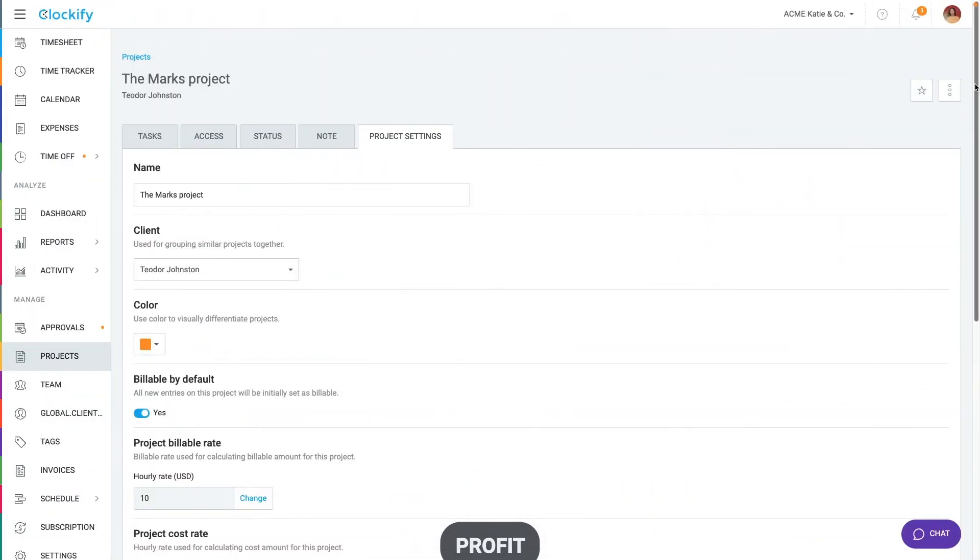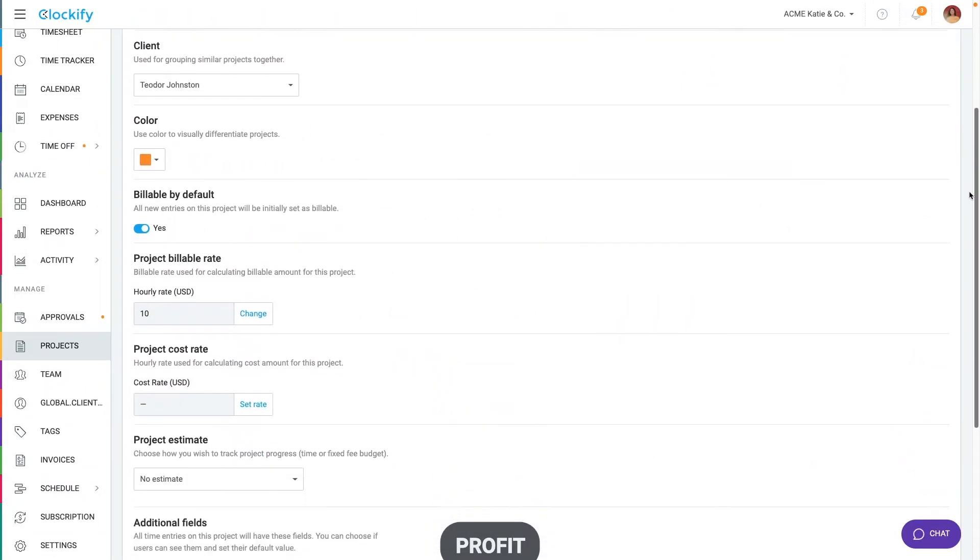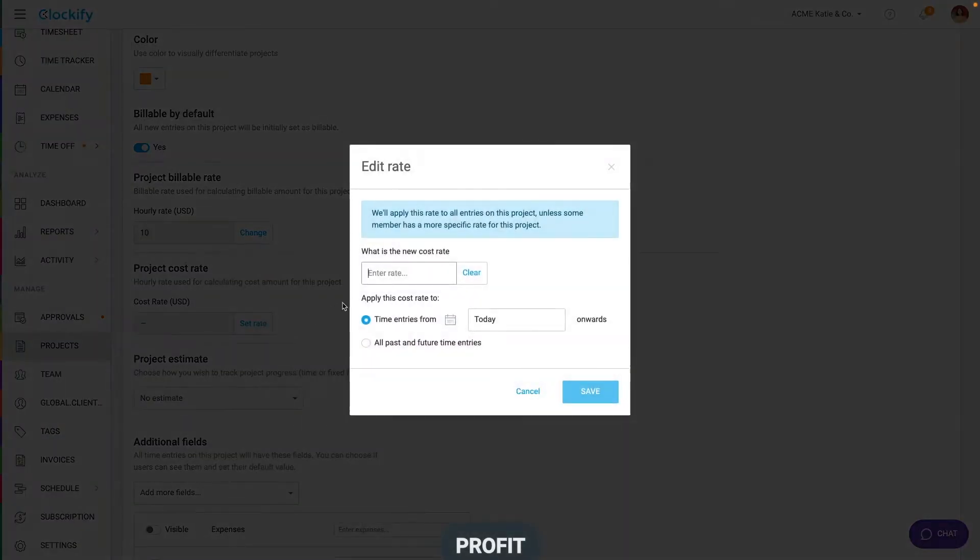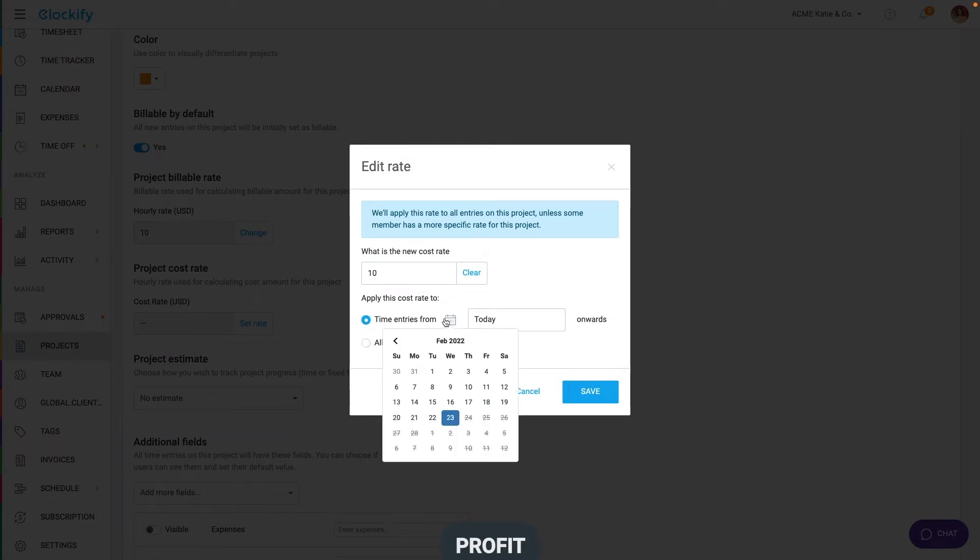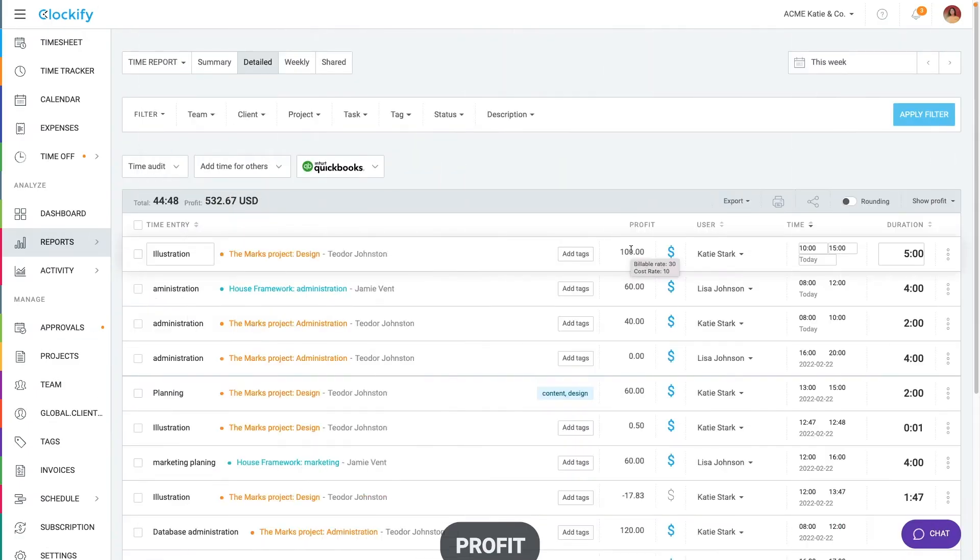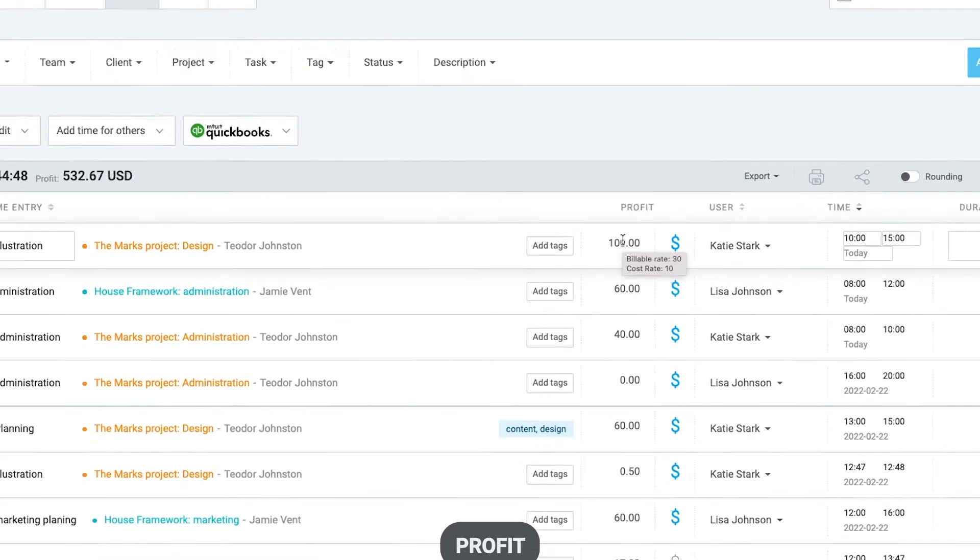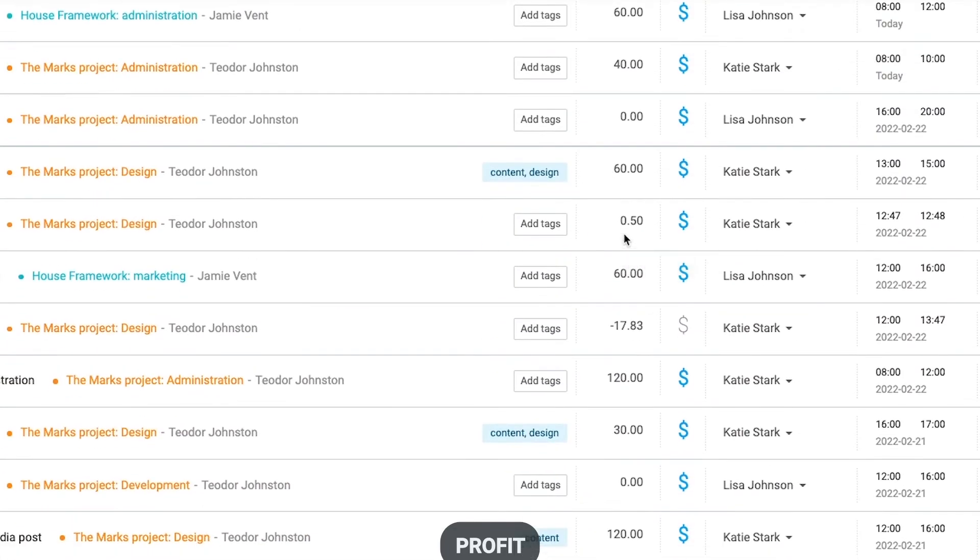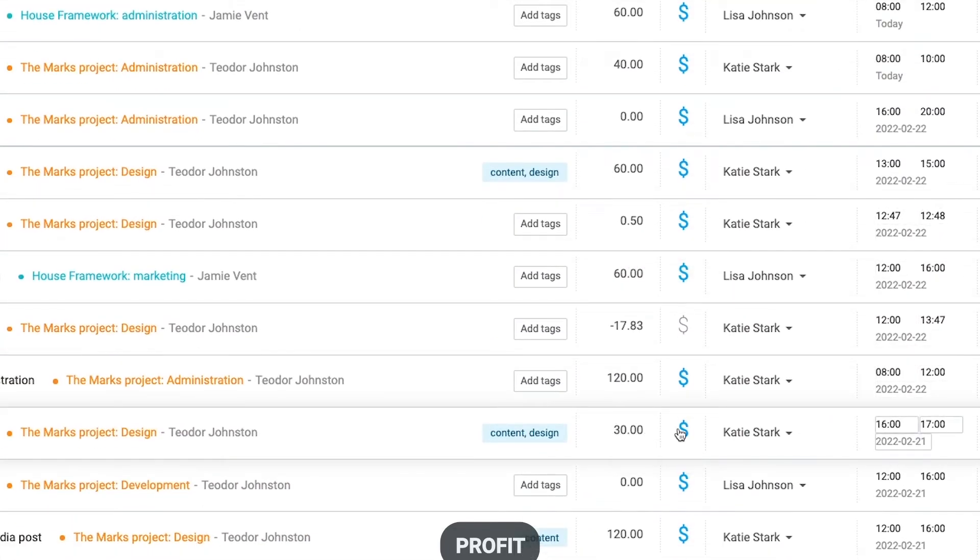Clockify also honours historic rates. So, for example, if you change project rate, you can either apply the new rate to all its time entries or apply the rate from a certain date onwards. Then when you make a new time entry, the new rate will be applied and old entry will retain the previous rate. But if you change the billable status of the old entry, it will inherit the new rate.